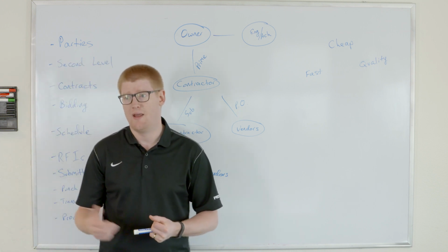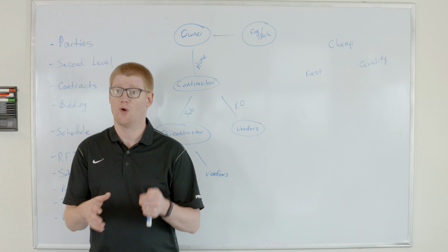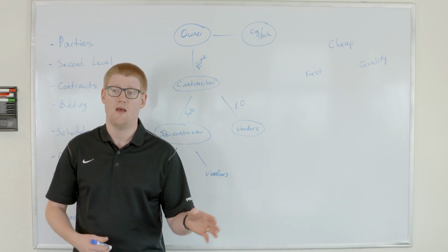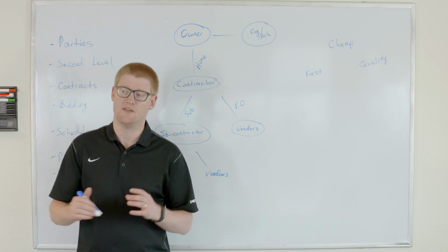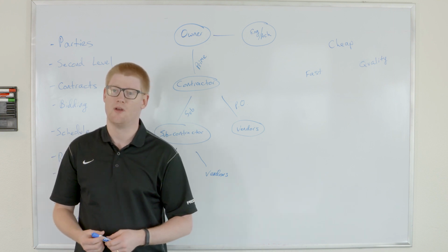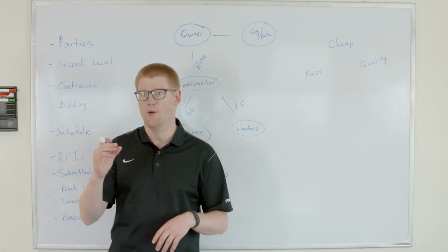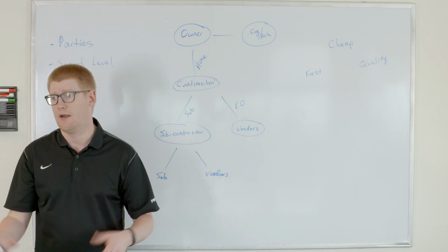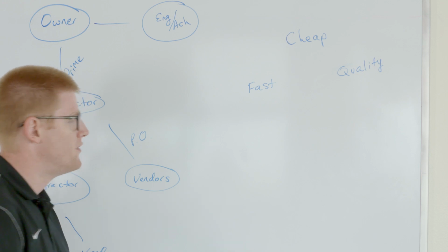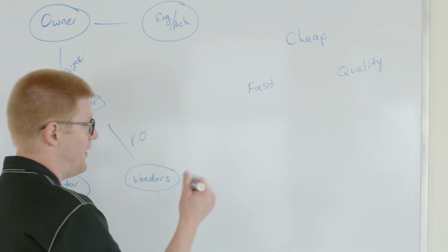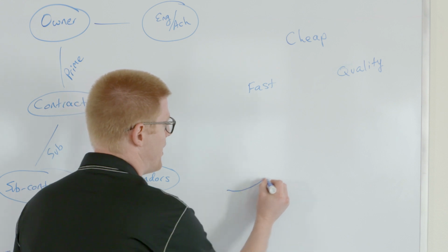So instead, you'd want to have a group of six guys come on, start pouring foundations. And as they get to the third foundation and they're a few days in, now behind them come the steel guys, and the steel guys put up the columns. And then right behind them come the electricians, and they start running conduit. And it carries on from there. So in other words, when you're looking at a schedule, you're tracking not just when things are going to be built, but your manpower on the job site.